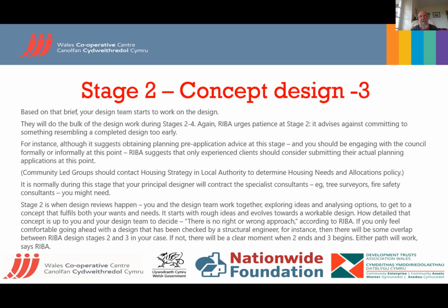And also, ideally, the group should be consulting with the local community group, the wider community, saying what their proposals are. It's fine to have your own ideas, but welcome input from the wider community, so you don't get NIMBYs saying, oh, I don't want that. They're green-headed monsters coming in doing this, and it's going to be a prison or whatever. You're not. You're doing something for the community. It's traditional, it's community-led. And then when planning actually goes in, they're less likely to object.